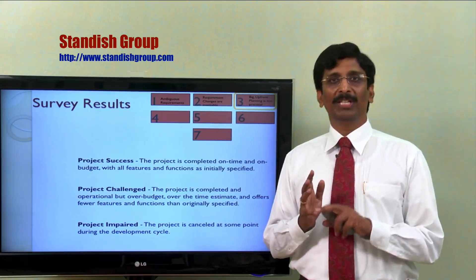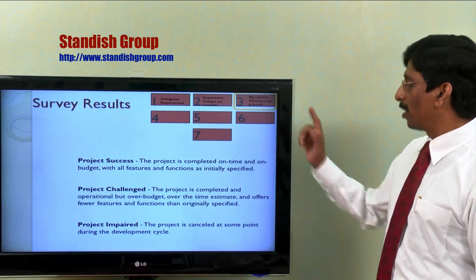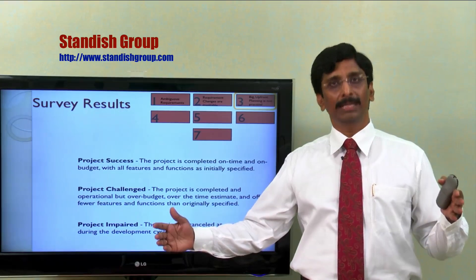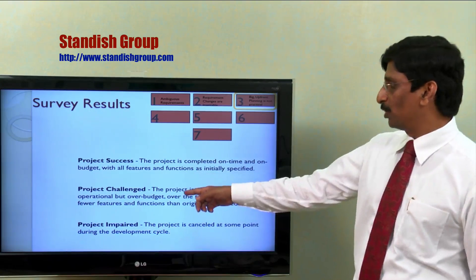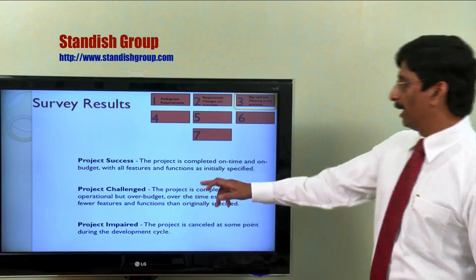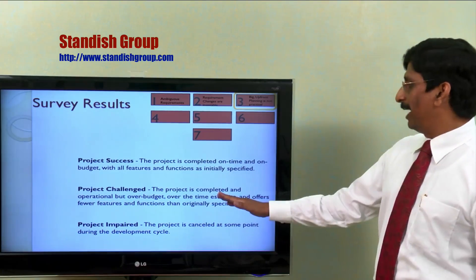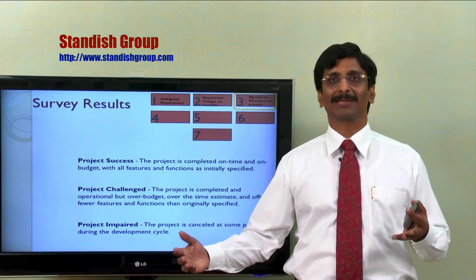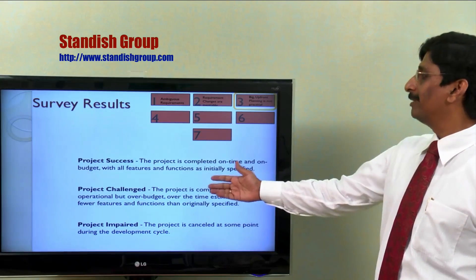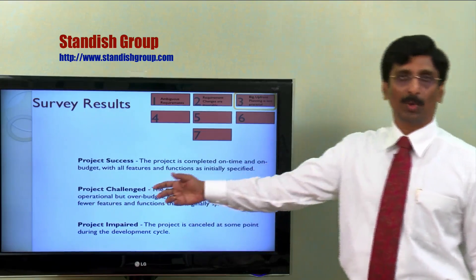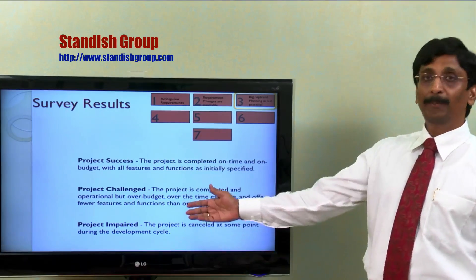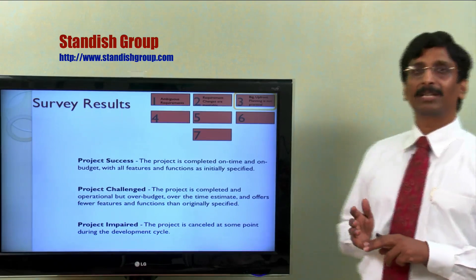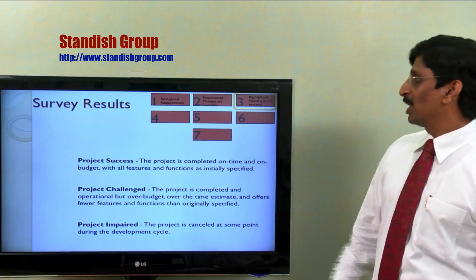After the survey, they categorized projects into three major groups. First: successful projects - completed on time and on budget with all features and functions as initially specified. Second: challenged projects - completed but over budget, behind schedule, and does not offer all features and functions originally specified. Third: impaired projects - cancelled halfway through or never reached the client.